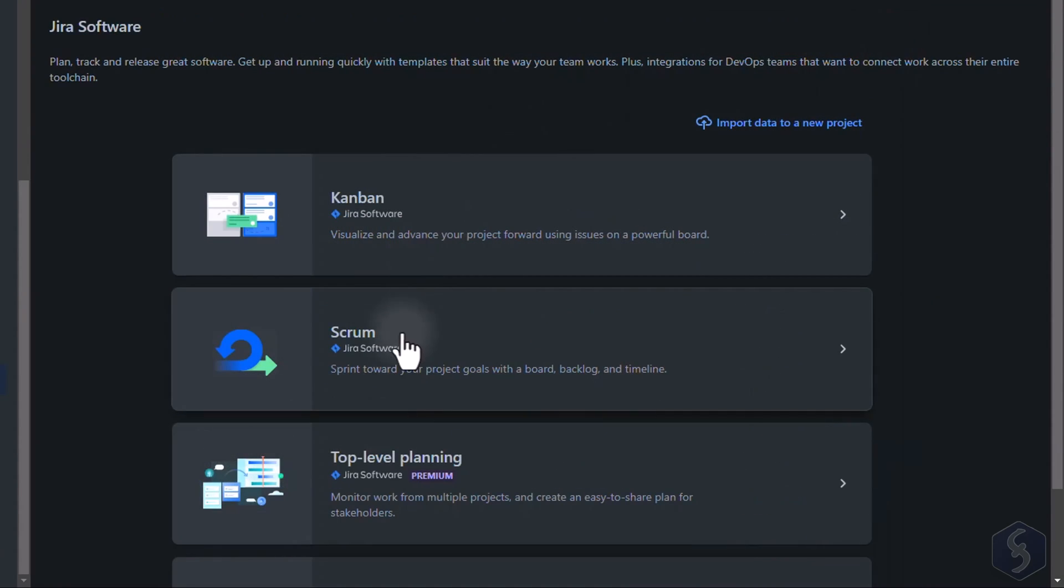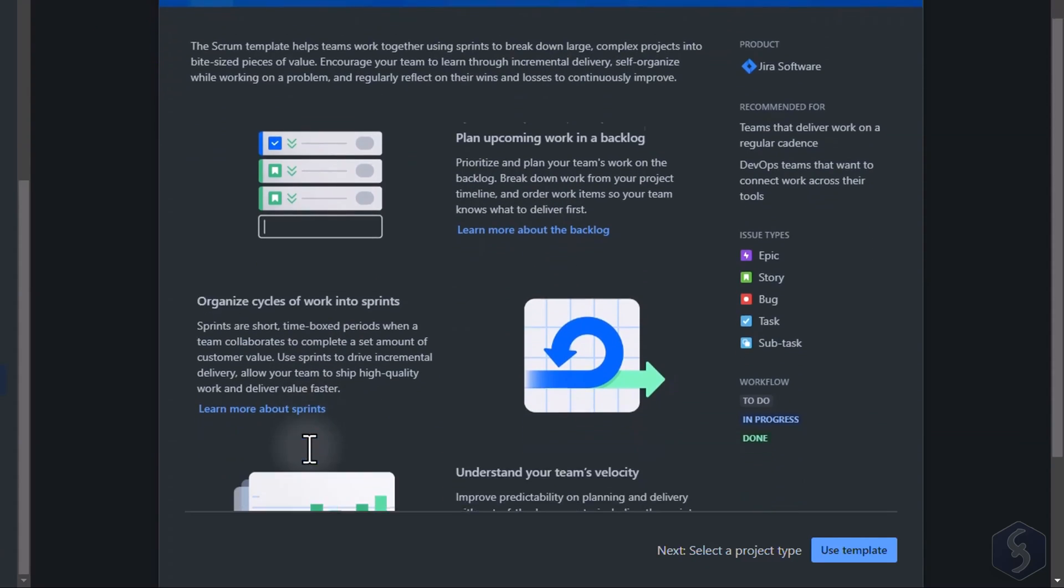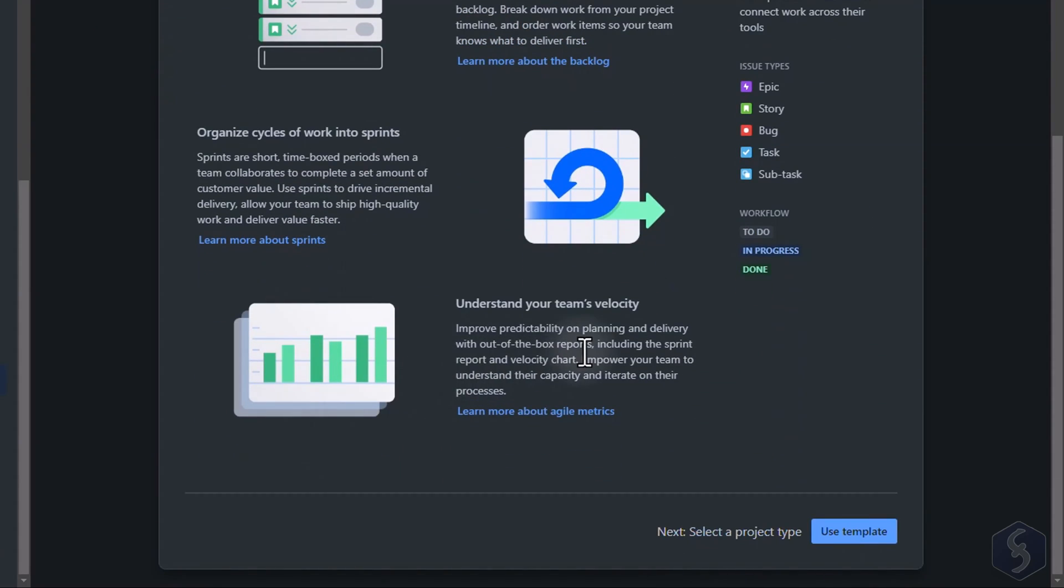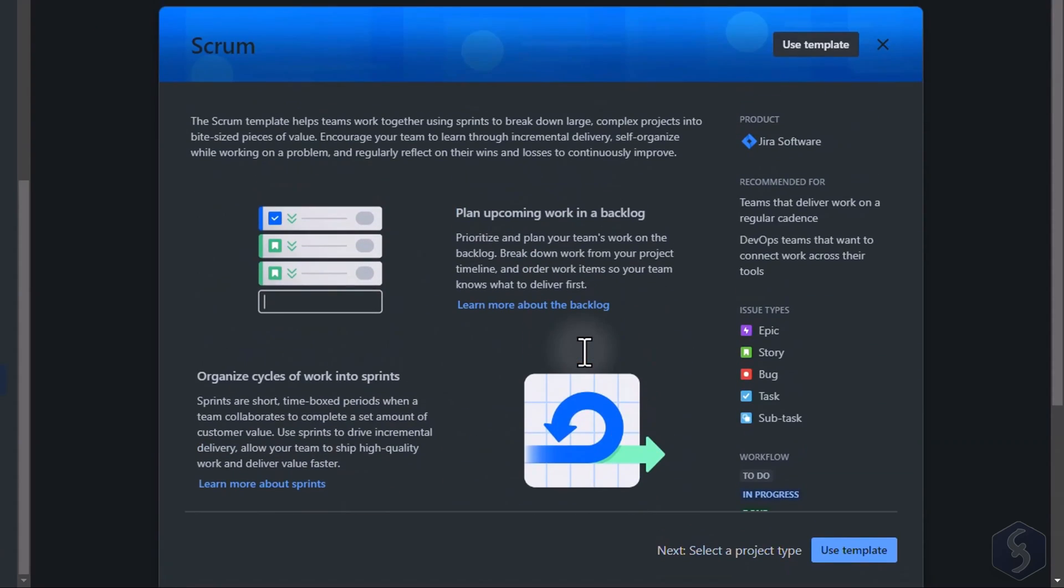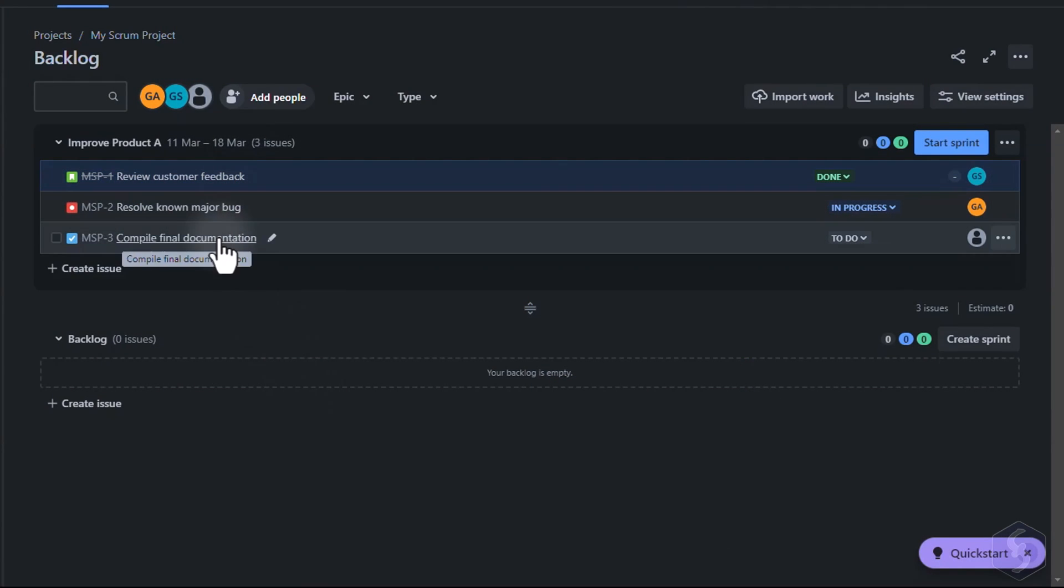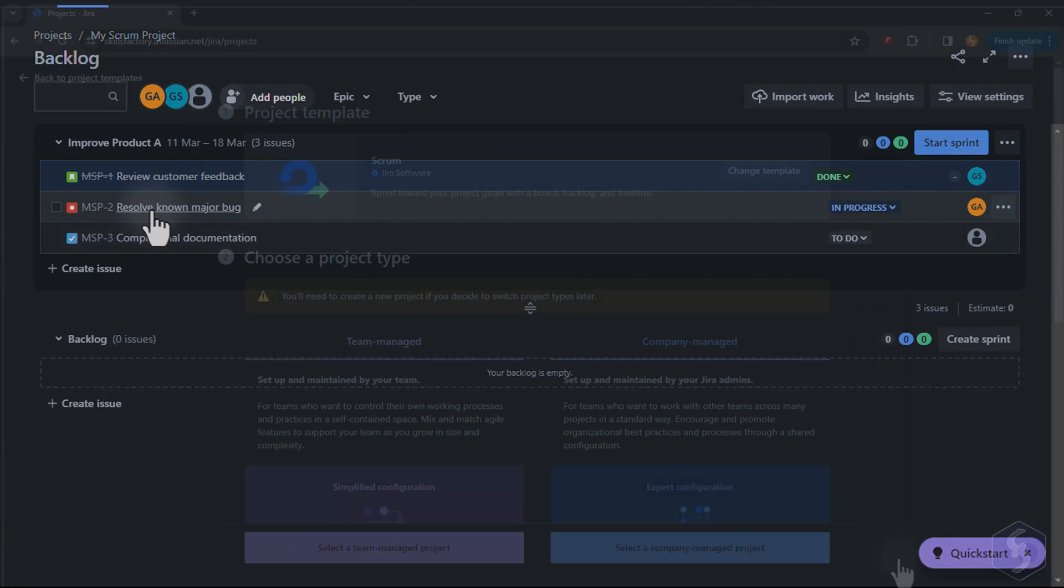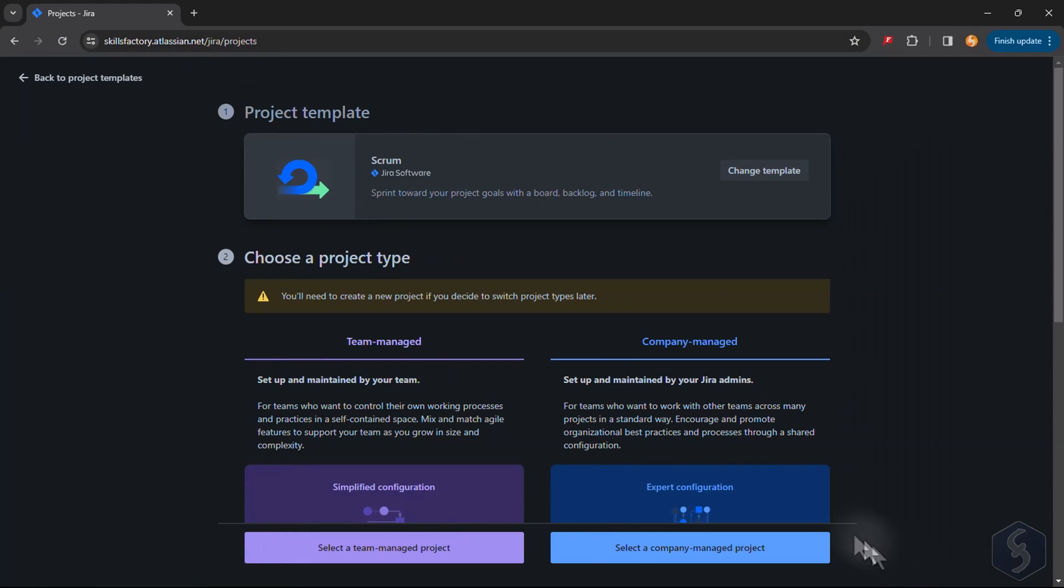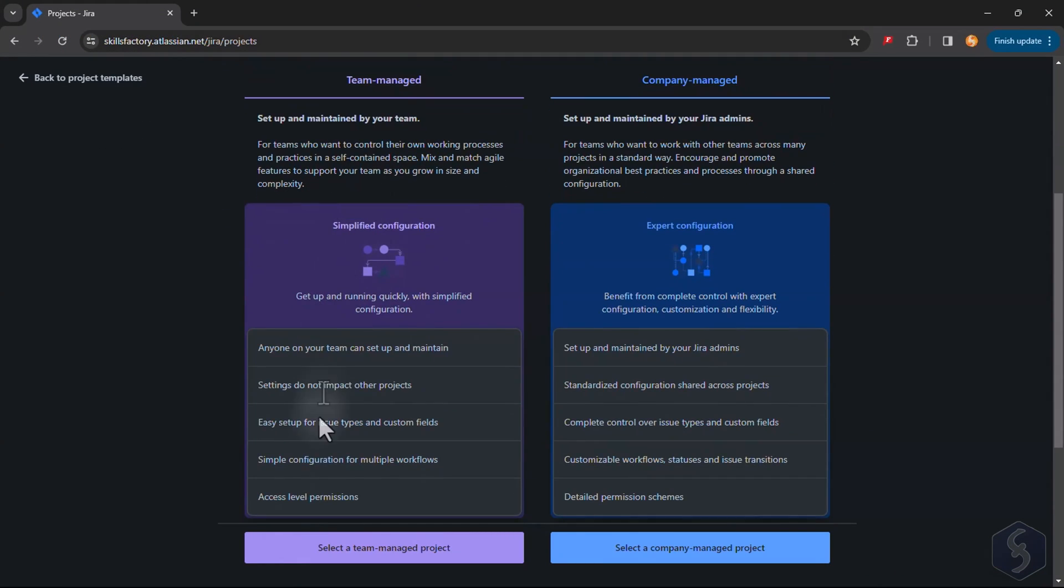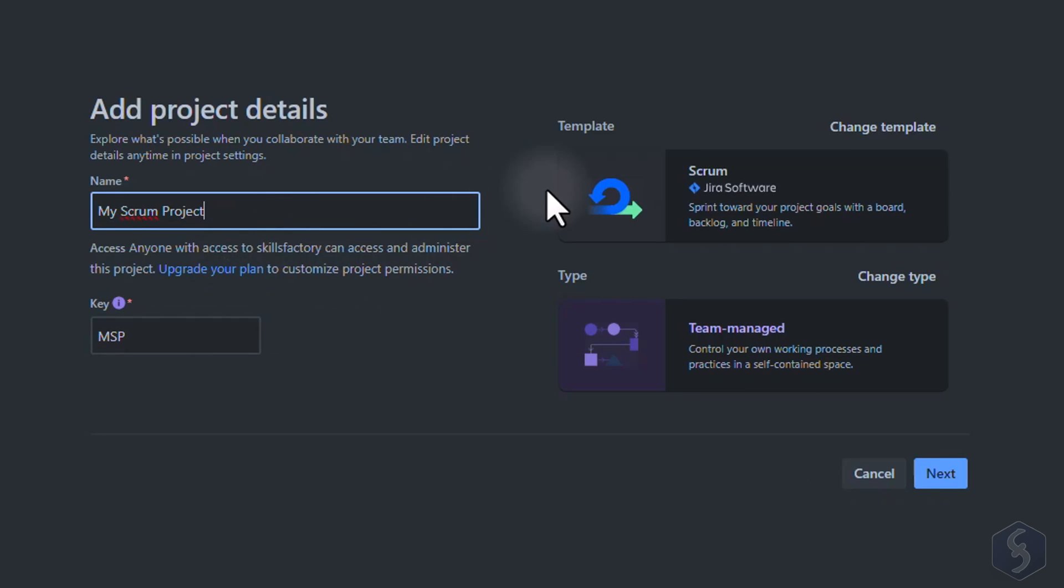Now let's see how to work with a team-managed Scrum project. The Scrum project is made of iterations called Sprints which help to focus on a specific scope or repeated goal rather than on the overall project flow. It also allows to break down a complex objective into simpler steps to learn and improve.